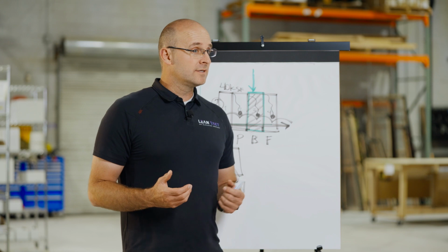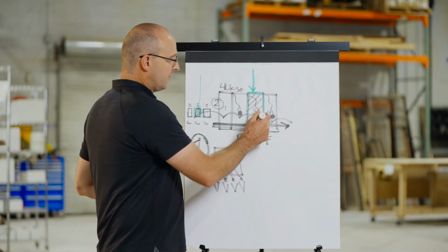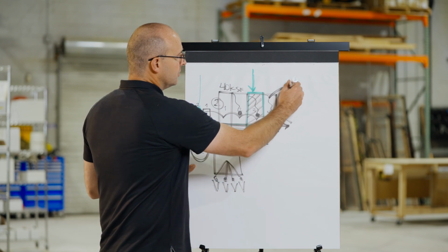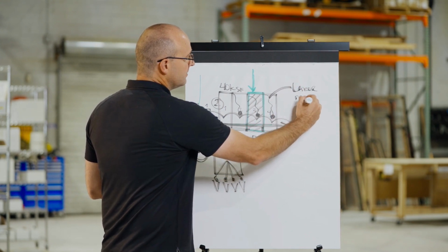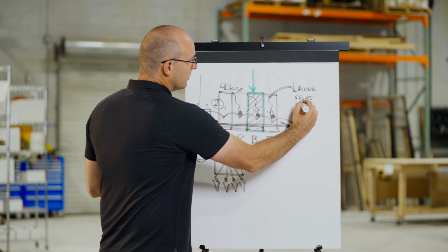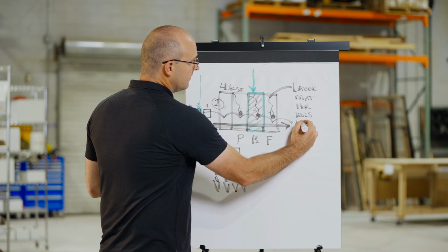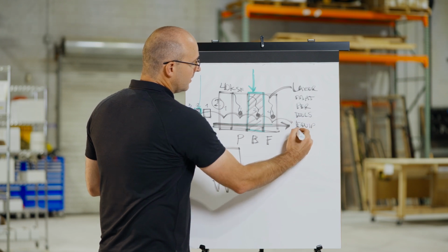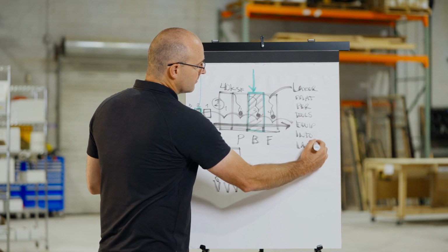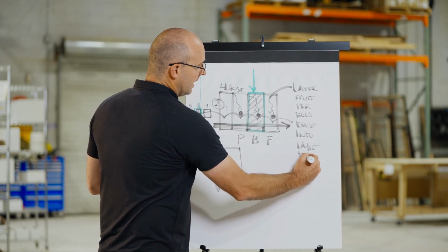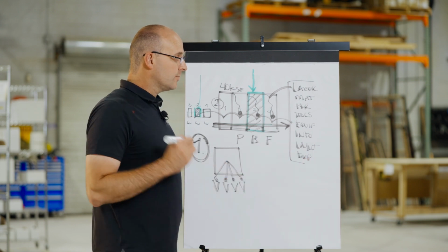The other thing is, when you're out doing your work, I want you to ask, hey, if I'm going into this next zone, do I have the labor? Do I have the materials? Do I have the permissions? Do I have the tools? Do I have the equipment? Do I have the information? Do I have the layout, right? Do I have the right expectations? Do I have all of these things? That's what we're looking for.